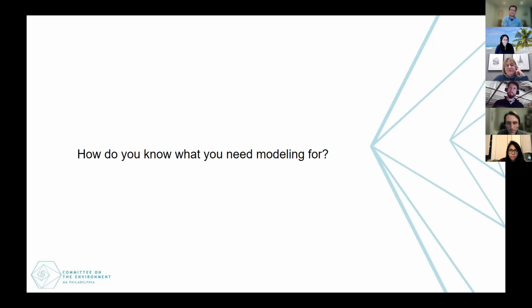And I'll chime in there. I think this is really important from the contract side of it, which is not always the most exciting part, but in terms of defining what your owner's goals are, the AIA documents are asking you to define what the owner's sustainable objectives are. And given the complexity you've heard tonight from Kit and Ryan and Heather in terms of these models, getting that information out there early on in your contracts is important, so that you have clear expectations with the owner on what you are providing.